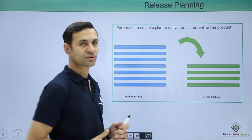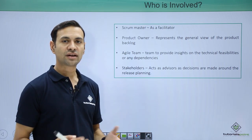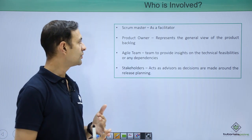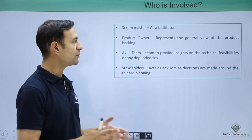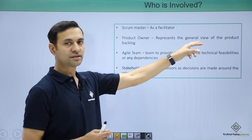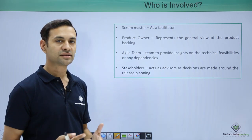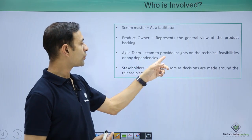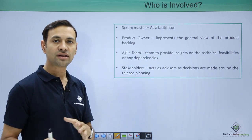This is the first step of release planning. Now let us see who is involved in a release plan. First is the Scrum Master as a facilitator, whose work is to facilitate release planning and to ensure everybody gives their input and knows the output. Second is the Product Owner, who represents the general view of the product backlog and acts as a client. Third is the Agile Team — the developers, testers, and team lead — who provide insight on technical feasibility of a particular feature and any dependencies.